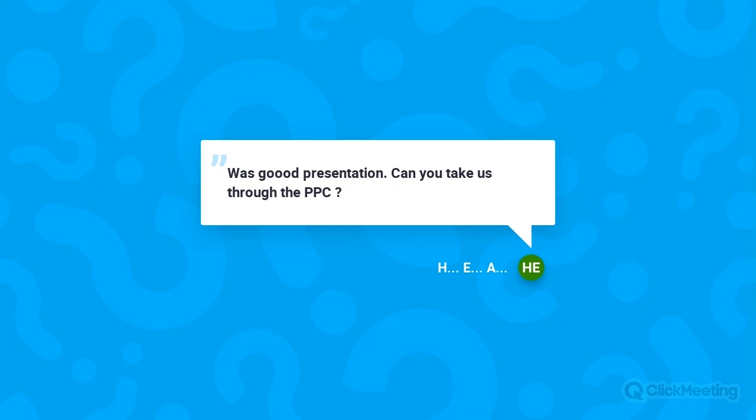And people find it difficult to understand that if finishing early doesn't contribute to PPC, why is it bad? Well, early on some construction projects is just as bad as late, because not everyone's ready, not everyone's prepared, materials might not be there. Do you know what I mean? We're going to have people, labor waiting around and things like that. So it is a measure of how accurately you can plan short term. So we want 10 activities to be finished in that week. We want at least 8 or 9 to be done. You're never probably going to get 100% because it's unrealistic, but as close to 80, 90% is really good. Hopefully that answered the question for you.